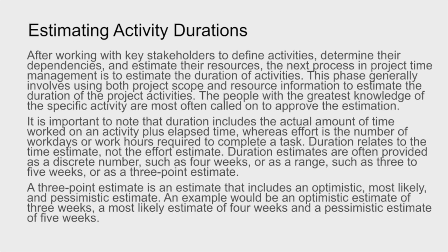It's important to note that duration includes the actual amount of time worked on the activity plus elapsed time, whereas effort is the number of work days or work hours required to complete the given task. Duration relates to the time estimate, not the effort estimate.